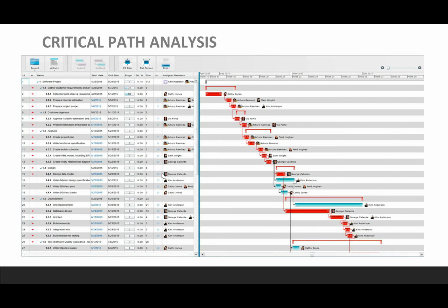All right, so first let's talk about your schedule. The first thing you do, once you get a request to move up your timeline, is you're going to look at your schedule. And not everything, but the first thing you're going to focus on is your critical path, right? What is a critical path? Again, the critical path is the longest path in your project. And it also means that if one task within your critical path is moved out one day or moved in one day, it's going to change the duration of your project. Okay, so this is something that we, as project managers, keep our eyes on all the time, just to make sure that our critical path is still intact and it's looking good.